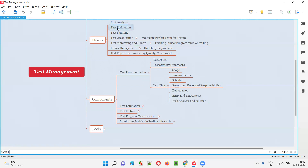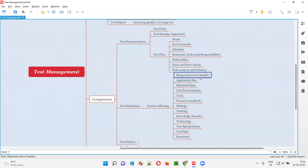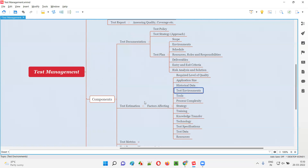Then test estimation. Test estimation is one of the phases, but it is a very big thing. What are the different factors which will affect test estimation? What level of quality is required — based on that, we can estimate how much time it will take. Application size — whether the application is very big or small — and historical data.